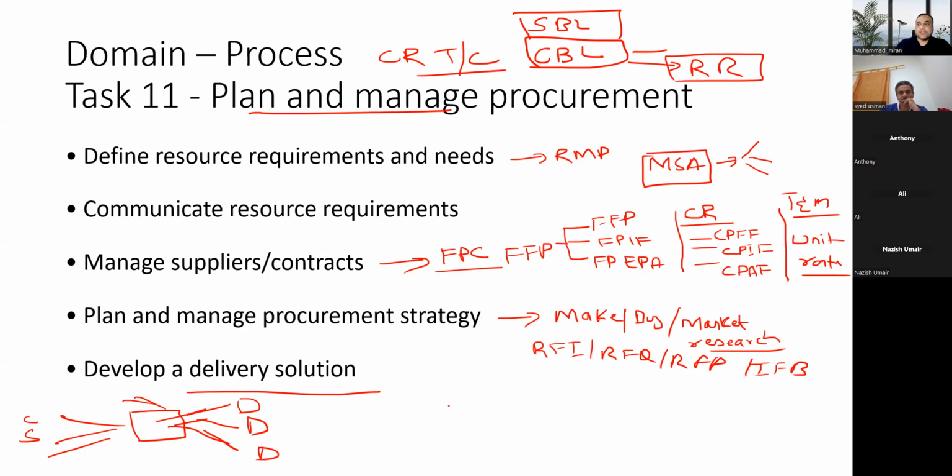If you are working in agile, we use spikes, and we discussed there are architecture spikes, there are technical spikes, and there are risk-based spikes to find out how much risk is involved, how many problems or things can occur with the architecture or technical side if we go with this project or with this feature. So that will be in our agile style. We can use a spike to find out the appetite of the stakeholders.